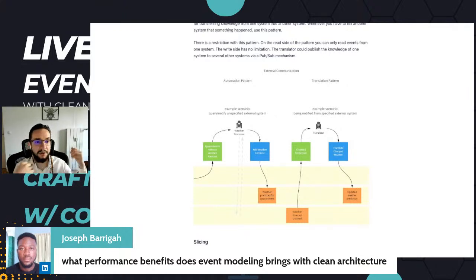Maybe you don't want to demo and you just want the hard backend stuff to be done first, right? So it gives the non-technical people some oversight on how the architecture will evolve, and in what order it will evolve. That is usually the most important part. When people ask you for estimations and a roadmap, they want to know in which order things will happen. Like what will happen first, and then what will happen next.